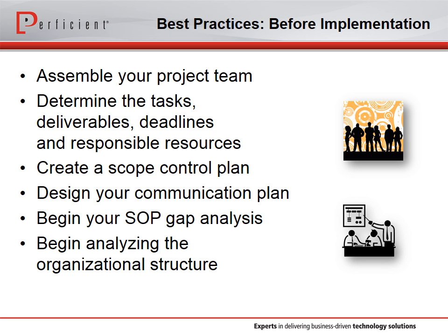Then write all of that down in a project charter and have the team formally agree to it. For team members who are non-managers, consider having their managers approve their employees' time commitment to the project in addition to their day jobs. You have to determine the tasks, deliverables, deadlines, and responsible resources. Be sure to include all of the tasks that we mention in these best practices, not just typical system development lifecycle and validation tasks. There's a lot more than just that.